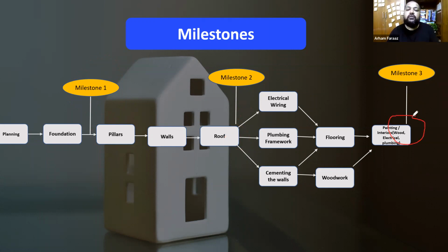So usually these milestones come into existence when we are talking about projects like fixed price projects. Okay, for fixed price projects, we'll use milestones. Like when I was working on a software project, we used to have milestone delivery. For example, after kickoff, a certain amount is paid. After discovery, a certain amount is paid. After building the code, some amount is paid. After going to UAT, some amount is paid. So these are all milestones on the particular schedule, right? We want to recognize the revenue. You don't want everything to come in the end and recognize later. So that's how you do it on fixed price projects.